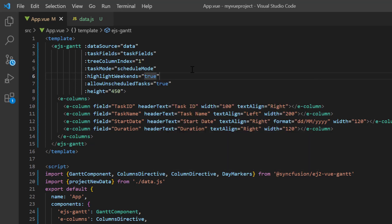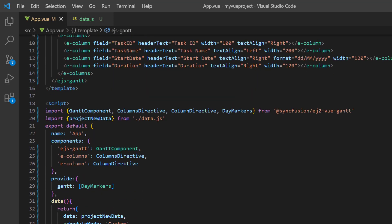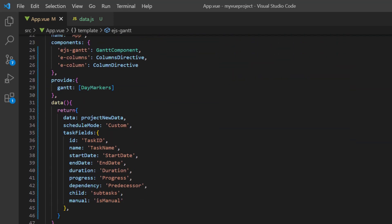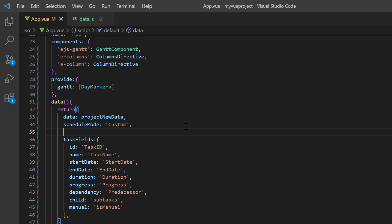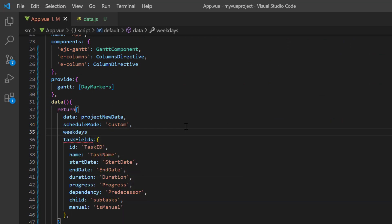If you want to include Saturday as a working day, use the work week property. To do that, I declare a variable weekdays and assign the values Monday, Tuesday, Wednesday, Thursday, Friday, and Saturday.